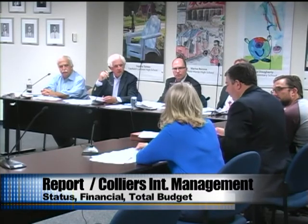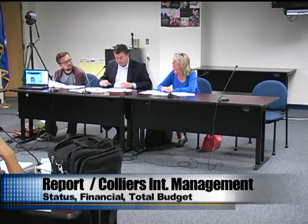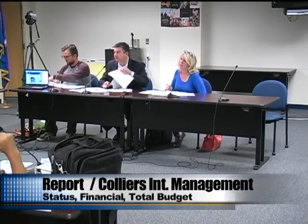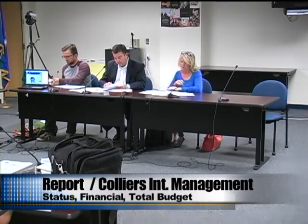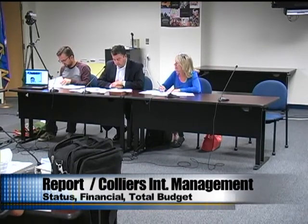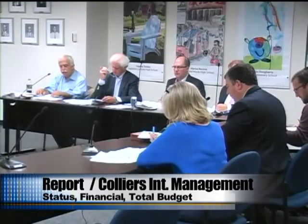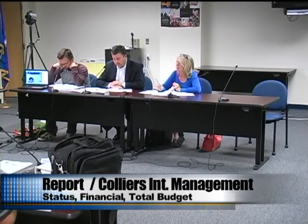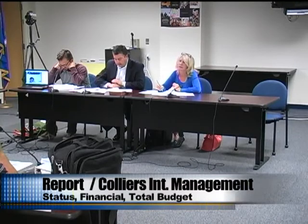I'm going back to Ben's report. We kind of glossed over the unresolved major issues and exposures. I was going back there for the 94,000, but I'd just as soon have you start. For the 94? Well, the potential risks. I think we're talking about the same thing from different directions. It's on page 3 of the narrative: low strength concrete, the structural steel anchoring methodology, mechanical equipment, landscaping, and ground cover. So you guys are seeing these as major issues and exposures.